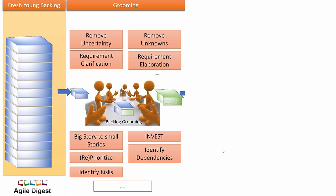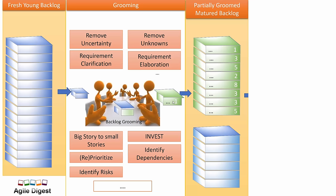The primary goal of the grooming session is that everyone picks one story, talks in detail about every part of the requirements, identifies all dependencies, all tasks that depend on cross-functional teams, and identifies risk — then we do an estimation. One story is picked, discussed, and estimated — for example as story point one. After the grooming session, we have multiple user stories groomed with story points defined. We do estimation through techniques like planning poker, complexity bucket, or whatever is comfortable, and mark the story as groomed.